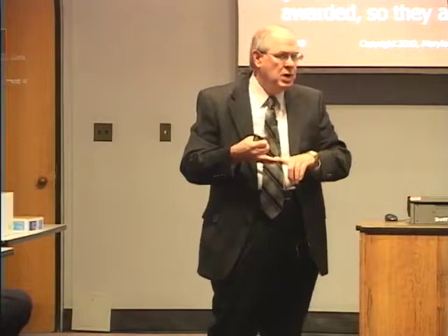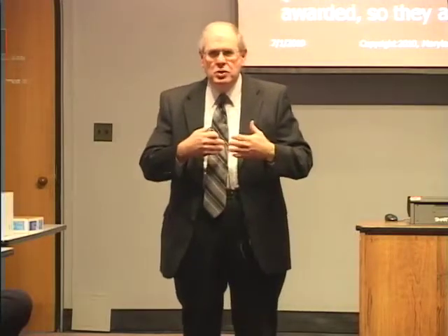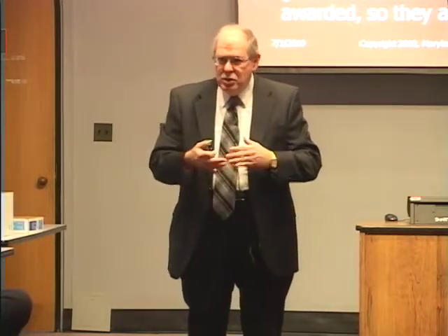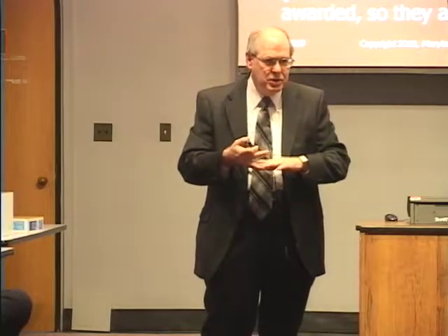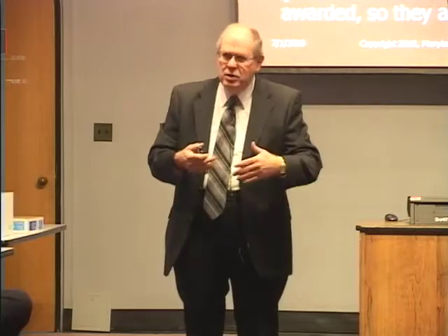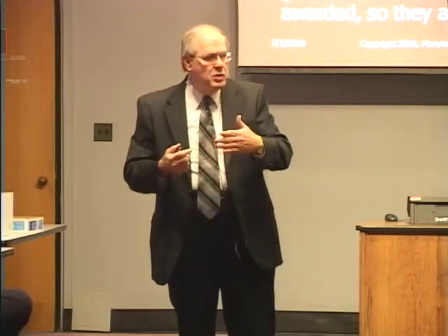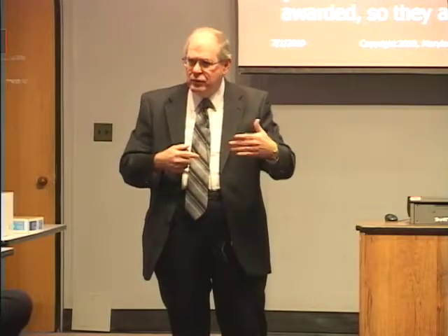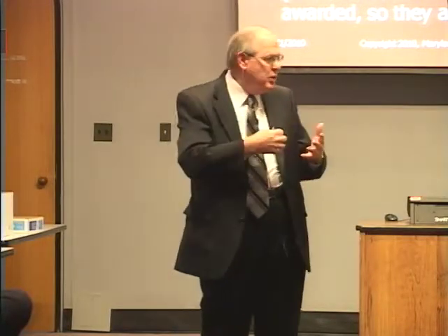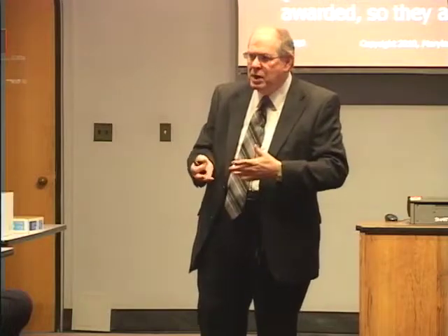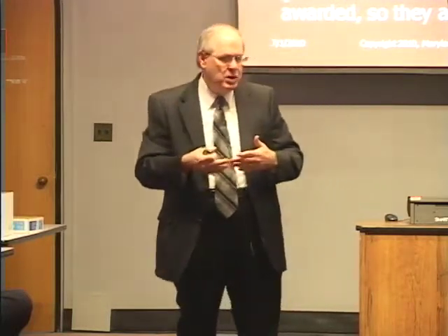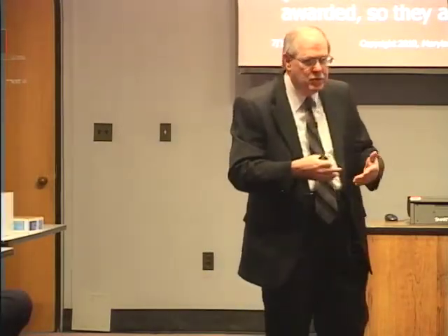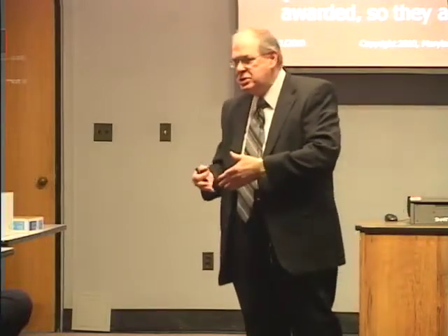And so what they try to do if a vendor that they have bonded is in problems, in lieu of simply paying out money, is either work with the company that has the contract to help them get over the hump and get performance up to par, or seek to substitute a new vendor for the vendor that's having problems. They have the option of choosing what they want to do, whether they simply pay money if it gets to the point of having to collect on a bond, or if they feel it's going to be a lot less expensive to provide additional assistance to a vendor that's in trouble, they will pay the money to assist the vendor.